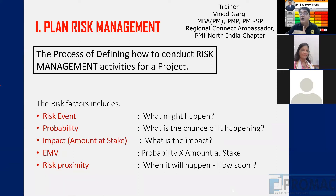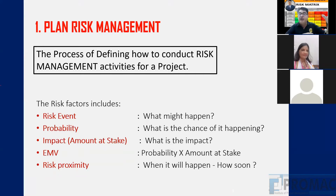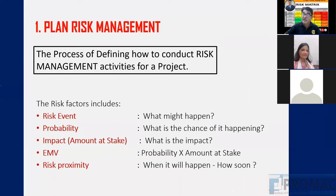Risk proximity means how urgent a risk is — how close it is. For example, June is going on, July is going on, it is very close. There may be a risk of labor during the rain season, and there can also be a risk of labor during Diwali. The proximity of the rain risk is closer.